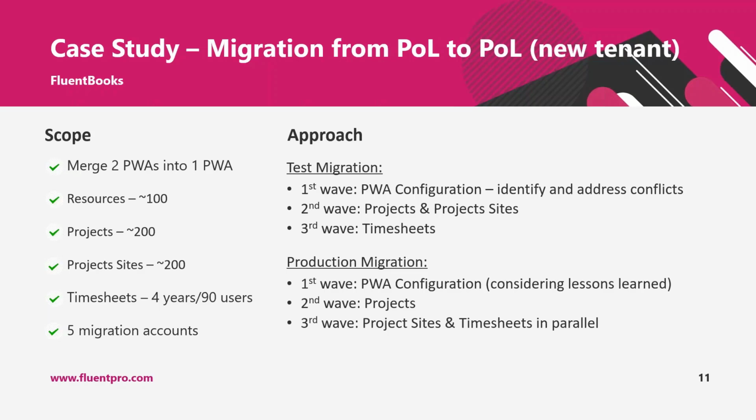Timesheets depend on the projects. So before the timesheets can be uploaded, all the projects should be already in the system. In the target PWA, they need to be verified and made sure that all of them are correct. Only after that, timesheets can be uploaded. But there is no dependency on project sites. So if you have several migration accounts, project sites and timesheets can be uploaded in parallel.